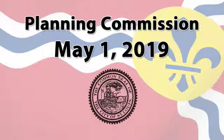Thank you. Commissioner Peoples? No questions. Commissioner Reese? Okay. Commissioner Stenhouse? No questions for me. Okay. Commissioner Devine? No questions. It's a great project. You may have answered, what's the estimated timeline if everything goes smoothly? The long lead item right now is approval for state tax credits, and we are optimistically hoping for that this summer. We've got the bulk of the financing lined up, so as soon as we get tax credit approval, we're ready to move. Awesome. Great project. Thanks.